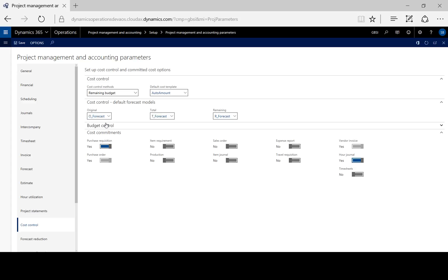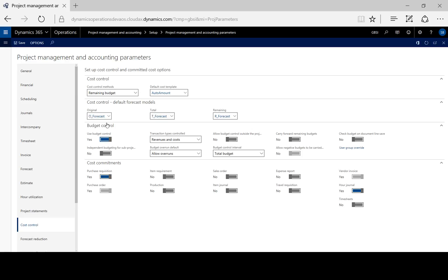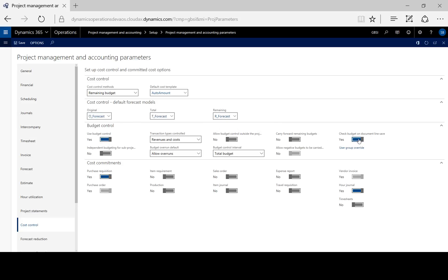Now to do this before the transaction is submitted to workflow, when the transaction is saved, we can toggle the check budget on document line save.